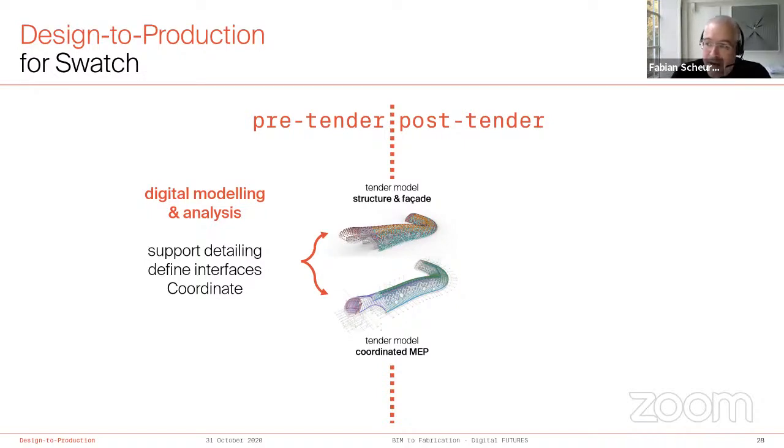We have no idea how you will build them, but as long as you stay within this hull volume, everything's fine. As soon as you want to stick your finger out of this digital 3D volume that we give you, there might be the timber guys coming with the chainsaw. So you have to be careful and talk to them before you get outside of your sandbox there, and vice versa, of course. And that proved to be working actually quite well.